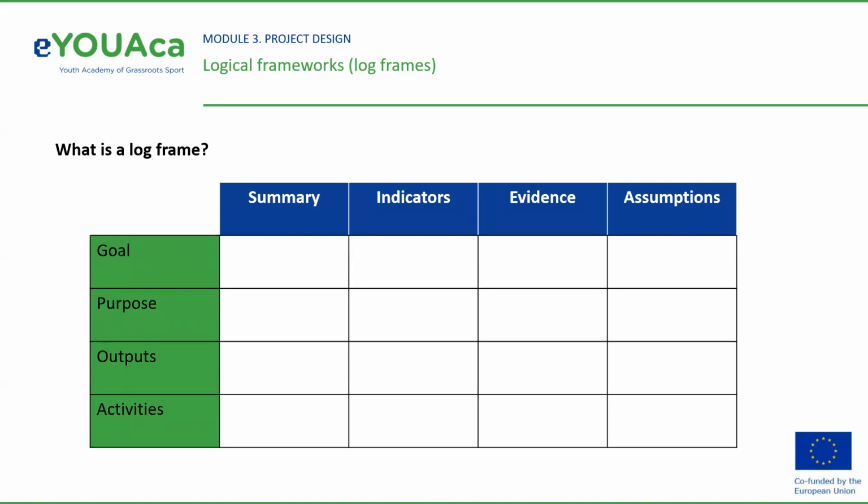The logical framework matrix, or more briefly, the log frame, is a matrix with 4 columns and 4 or more rows, which summarize the key elements of a project plan, namely the project hierarchy of objectives, first column, summary; the key external factors critical to the project's success, fourth column, assumptions; and how the project's achievements will be monitored and evaluated, second and third columns, indicators and evidence.